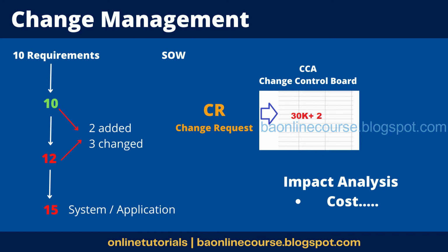who are the people, or maybe if you are in the testing phase and you don't have a business analyst or maybe an architect to do the designing right away, right? So all those dependencies, you would analyze the current situation, say these are the issues we have. So we need to onboard a business analyst and a technical architect to perform these activities for another 1 week, right? Okay. So you'll give that impact analysis over there, to get this done.